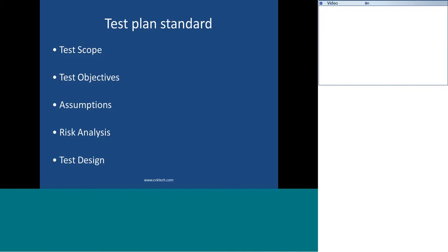Based on the categorization and our analysis of the requirement, there are requirements that are testable, and there can be requirements which are not feasible for testing. When there is a requirement which is not feasible for testing, that will be out of scope for us. Before we decide whether it is in scope or out of scope, we should have a dialogue with the business analyst and the development team, and only after the dialogue and mutual understanding of that particular requirement, we should draft that requirement as out of scope or in scope.